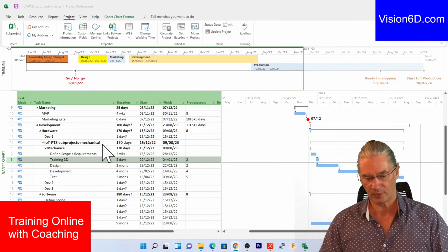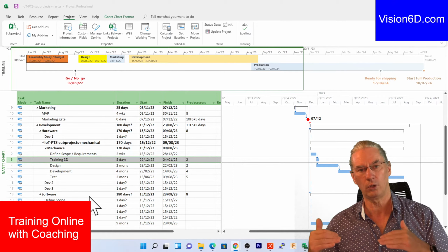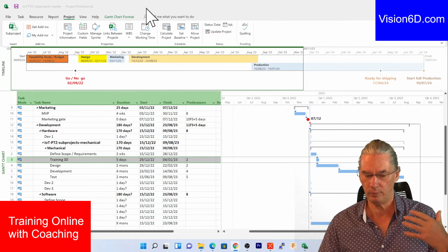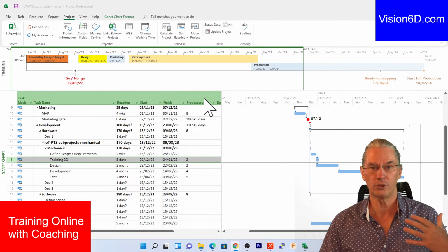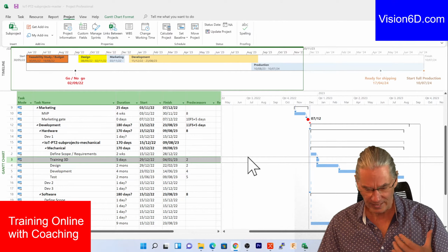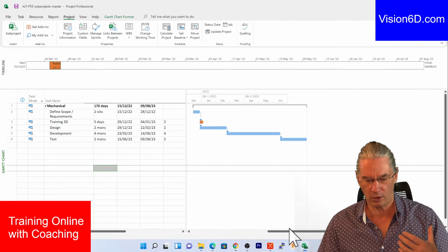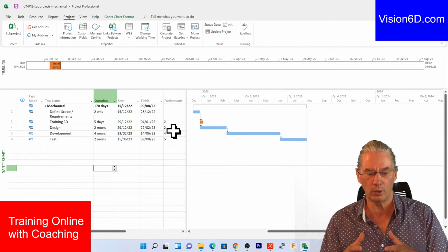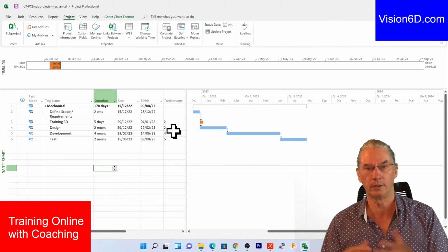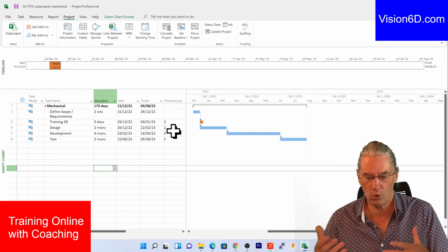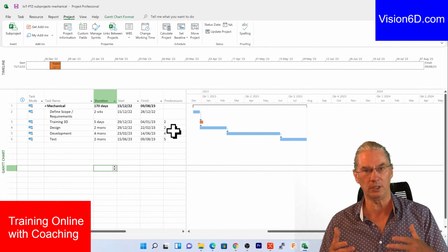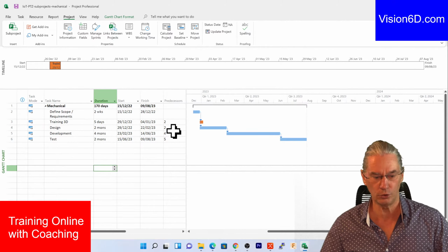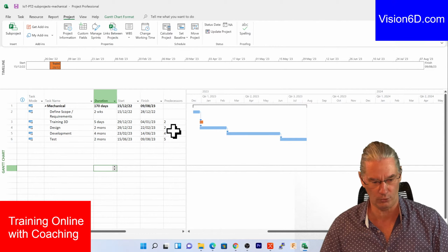So this is also an illustration of something that can be of interest to you. It means that, for example, the general flow of the project, what is represented by the master file, you can maybe use it with all the stakeholders. And the details of how this part of the project is handled is maybe more with the team dealing with the mechanical part. This is one way, one approach. There might be others, but it's worth having an idea of the use of the sub-projects.